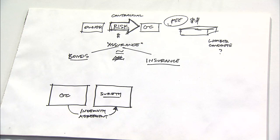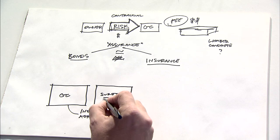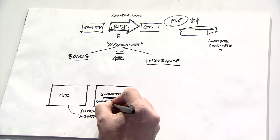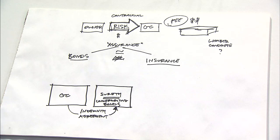And there's a relationship here that has to be developed through what's called an indemnity agreement. What the indemnity agreement does is it establishes the relationship between the surety and the general contractor, and it says that the surety is willing to consider the underwriting of bonds for the general contractor in exchange for a premium.